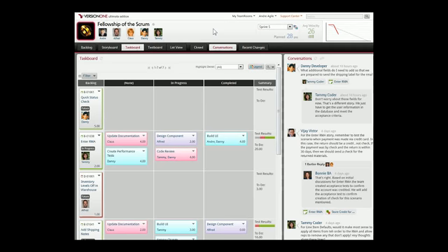Finally, when you get back to looking at the reports that Mike mentioned, the team has some feedback here on their currently planned sprint. In this case, we've planned a little more than our average velocity, and we can get some insight into our average velocity up here. We also can see our sprint burn down. That's really the view that the team is going to be most focused on in terms of understanding how we're progressing within a particular sprint.